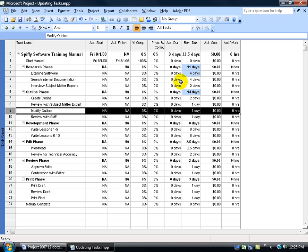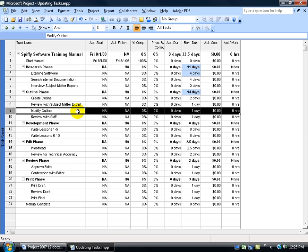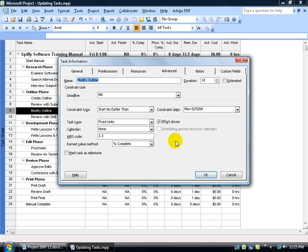If you can picture the Gantt chart, is that the black bar for the research phase is getting pulled back by one day and the outline phase is getting stretched out one day to take up the slack. But it can't pull up the end slack because of that task constraint that starts no earlier than August the 25th.